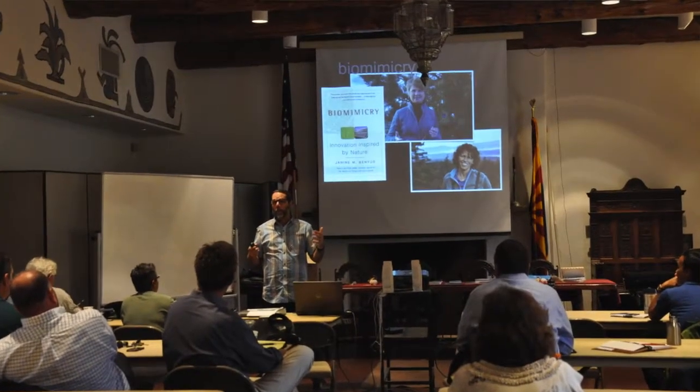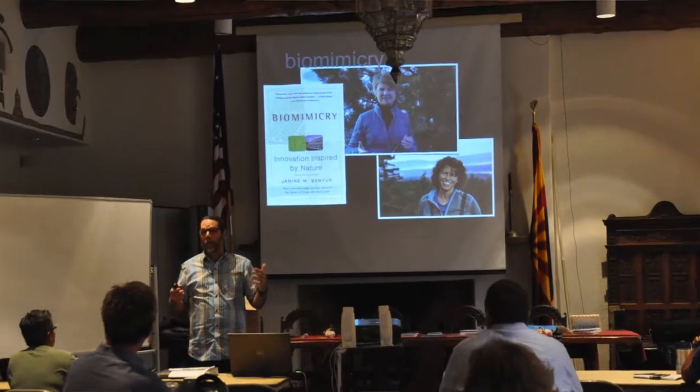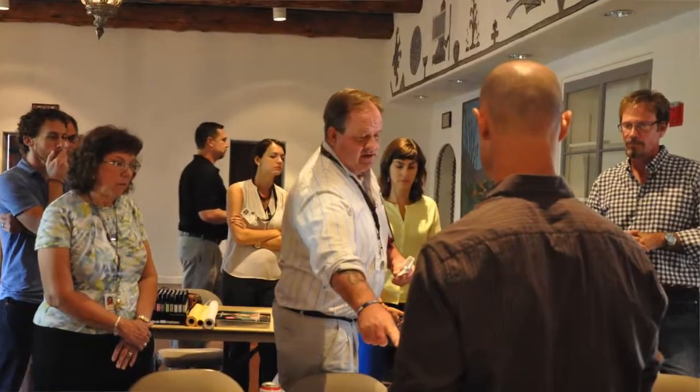We wanted to use the integrative design process, and that process is one that kind of breaks the conventional paradigm of how projects are designed. The integrative design process brings all of those people together right away, along with all of the consultants, all of the stakeholders in the project, so that everybody is discussing things from the general to the specific. An architect and a contractor and the client actually all come together. Shareholders, trustees, staff, everyone that has input into making a project become a reality.